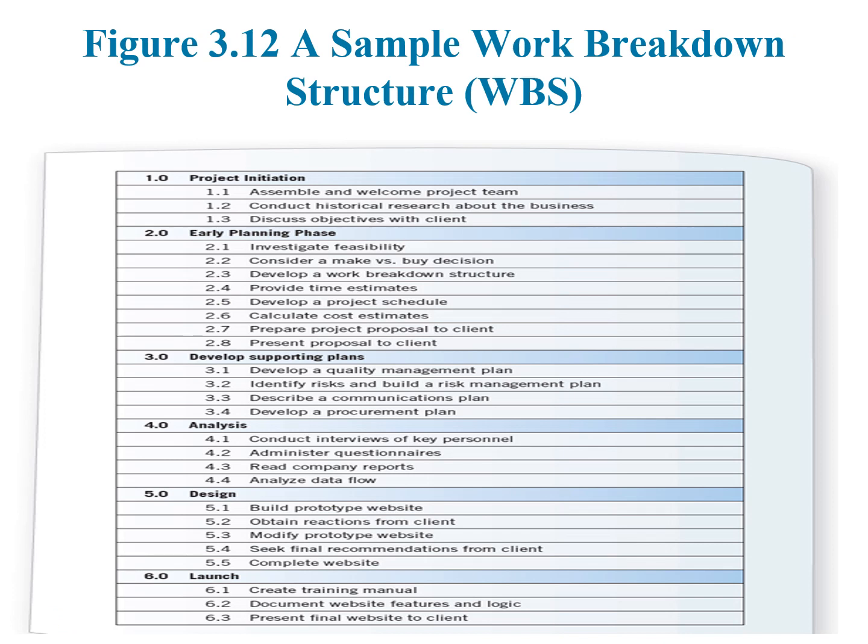Figure 3.12 shows a sample work breakdown structure. We have main themes: project initiation, early planning phase, develop supporting plans, analysis, design, and launch. Under each main phase or deliverable outcome we have several activities — for example, assemble and welcome the project team, conduct historical research about the business, and discuss objectives with the client. These activities are manageable and easy to assign to a person or group.